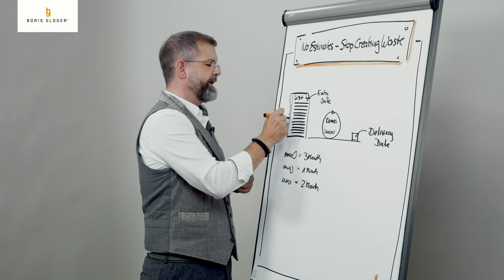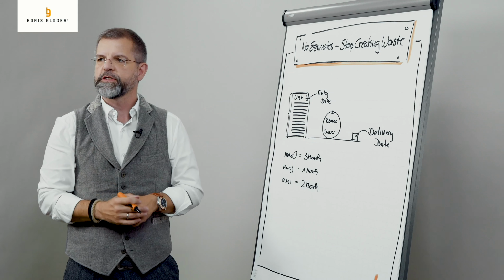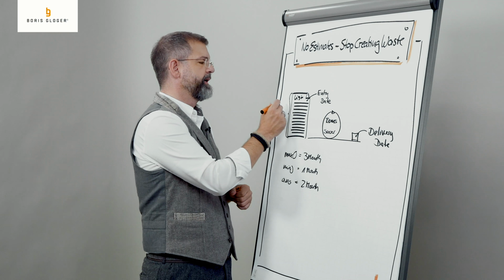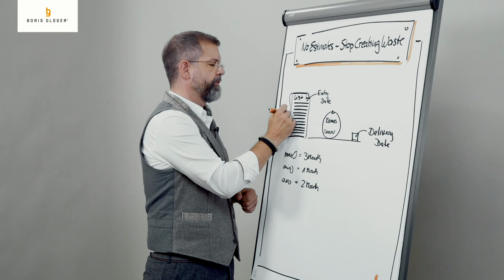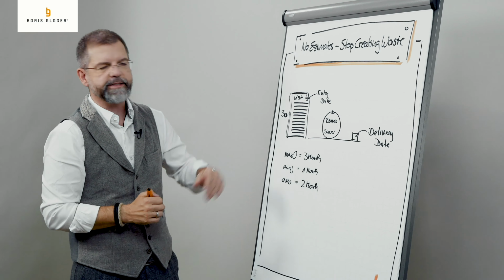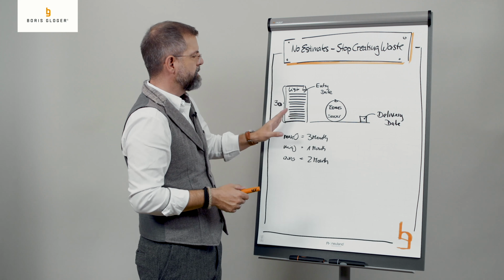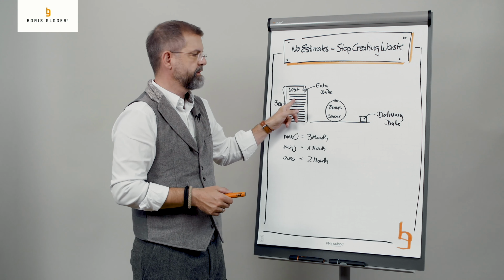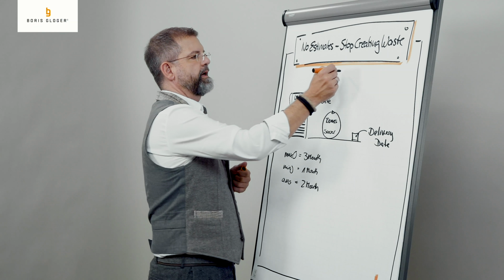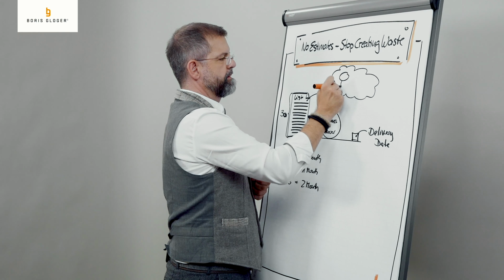You just say, at this moment in time, when I start with my observations and noting down all these dates, I had maybe 30 items in my list. And now we fix that amount of ideas. So it means we only allow an entry into that list when you have delivered something. That typically creates a cloud of ideas.